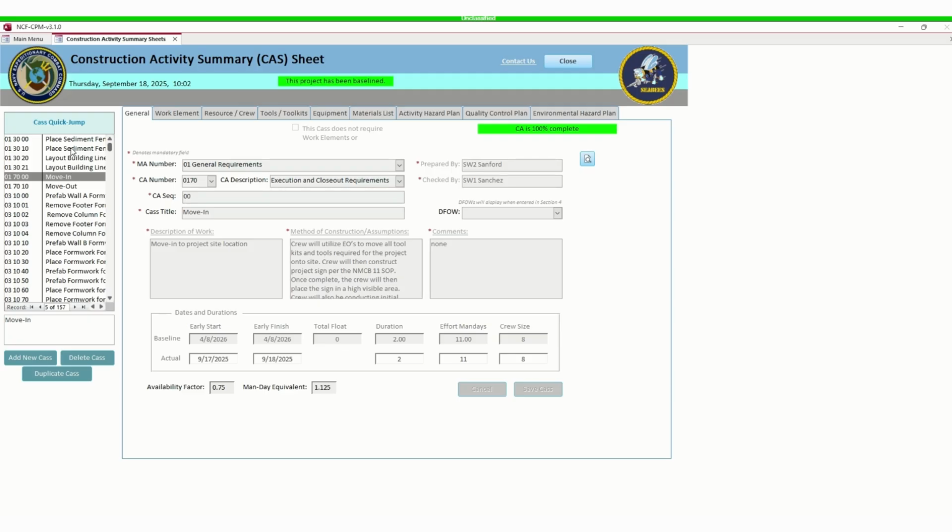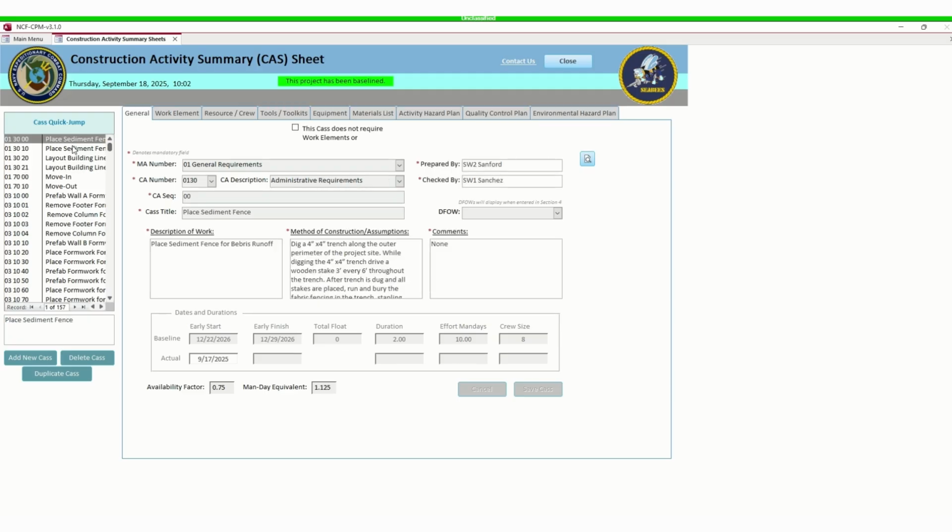And like I said, if we had issues where we had any rain, you want to put it in the comments, if we had 1 day of rain, 4 hours of rain, and no work could be completed, put that in the comments as a tracker.